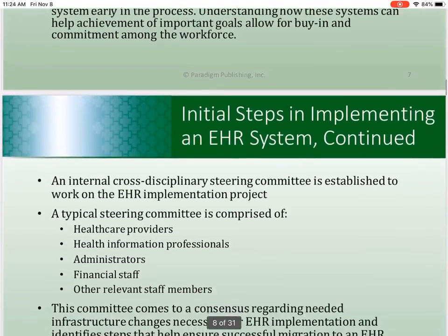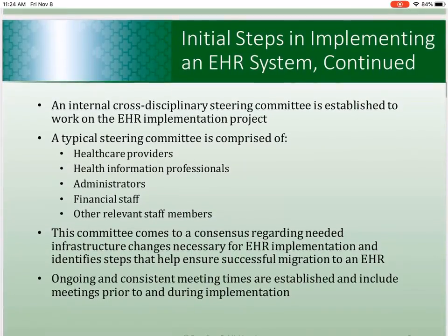All right, going down to establish a committee. To move the EHR implementation process forward, a healthcare facility must create a cross-disciplinary steering committee whose members represent groups with a direct role or involvement in the proposed EHR system. A typical steering committee is composed of healthcare providers, nurses, health information professionals, administrators, financial staff, and staff members of other integral departments. The committee is led by a chair or co-chairs, and these are usually clinicians, and is tasked with examining factors such as operational issues with current technology infrastructure.